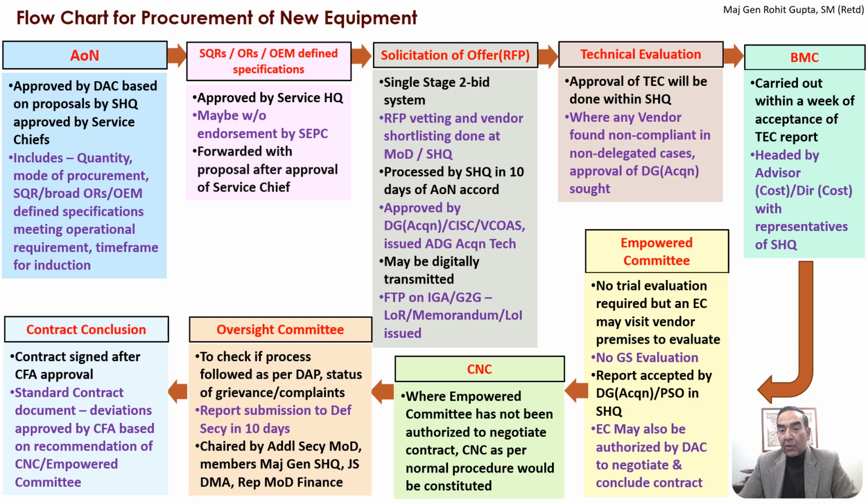As soon as the TEC report is constituted, the benchmark committee will be alerted, and within a week of the report being rendered, the benchmark committee will come in. It is headed by the advisor cost or the director cost, depending on non-delegated or delegated powers, with representatives of the service headquarters.